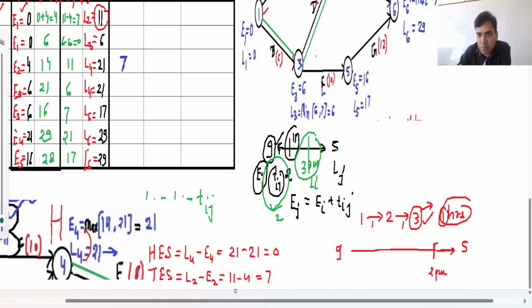So without affecting this period, this first activity can be completed within this period. This means if we talk about this second activity, the total float is 9 to 5 minus 2. If you are talking about 9 to 5, there are 8 hours and 2 hours are required. So the total float is 6 hours if the activity is only the second activity. But at 2 p.m., the earliest time of this next activity 3 is 2 p.m.